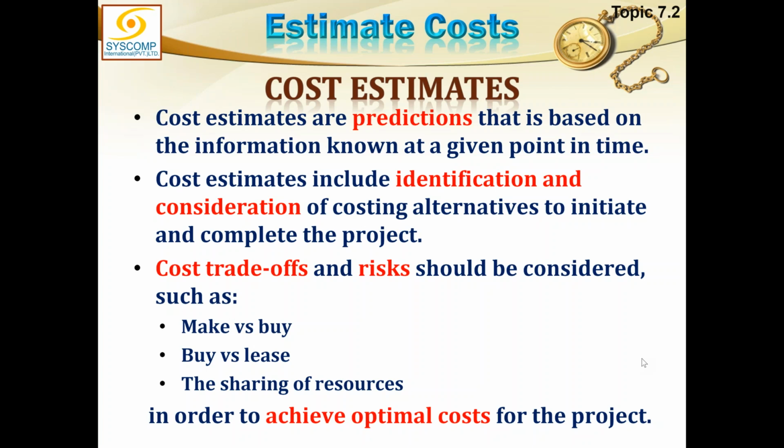1 year? If I do not have assured business of multi-story high-rise buildings, exactly, I have no fun in buying the crane. But if there is some business lined up, and I am sure that I am going to be needing this crane time and again, and I find that leasing or hiring or renting this crane is costing me much more, then probably I will like to buy it. But if I do not have a steady business and it is a one-time activity, probably I will be going for leasing or renting this crane. Are you with me, all of you? Yes sir, agree.